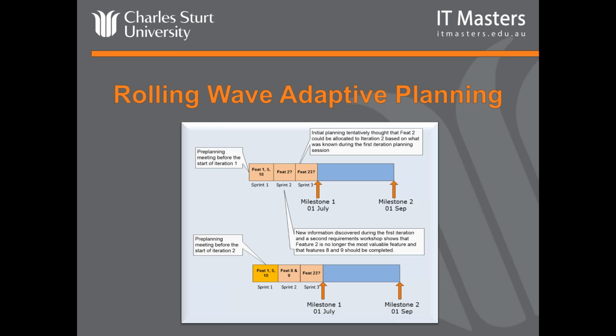And that's probably one of the myths in Agile, that you could be in the middle of the sprint and the product owner can change their mind. No, it doesn't work like that. They're allowed to change their mind and make something the top of the list for the next one. And that's how we manage that change, through doing adaptive planning.